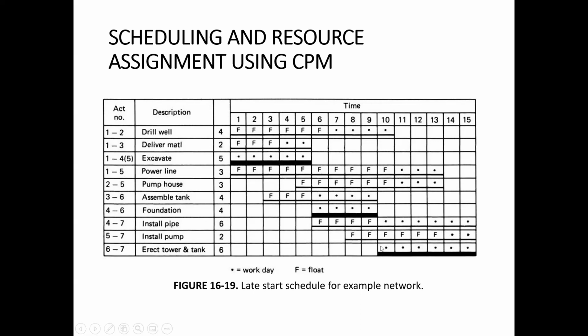Although it will not be a very convenient schedule, since we are starting each activity as late as possible, the flexibility in the schedule becomes less and less. Therefore, the late start schedule is not very useful for our scheduling purposes. Only the early start schedule is very useful for our purposes. But more practical schedules are those which are somewhere between the early start and the late start schedules.